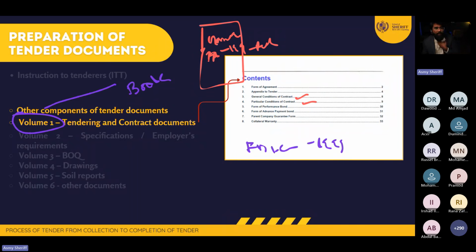And also, I want this contractor to come to the project, and we all know that as construction industry personnel or commercial people, right? Once we enter into the project or maybe contract, we need to submit a performance bond, or maybe some kind of bonds, or maybe some kind of insurances or other things that I need to provide to the client, right? Do I need to provide that? Yes, because if any problems come or any issues come or maybe any concern come, right? The client's going to come and handle that. He does not want to handle that problem later, think about it. No, now he wants to think about it. Any problems come, okay, I'm going to take the money from the bank or ABC or XYZ.